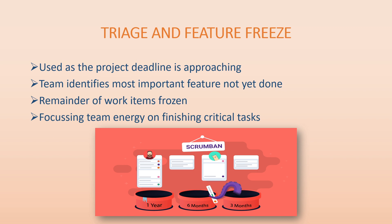The final feature is Triage and Feature Freeze, which is used when the project deadline is approaching. At that point, the team needs to focus on critical tasks rather than trying to complete everything. By focusing only on the critical items, the team can ensure they release on or before the deadline. That's all about the Scrumban methodology.